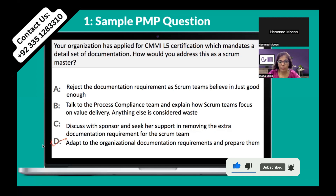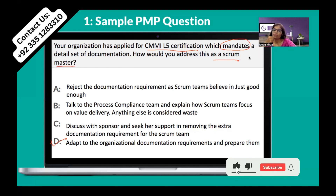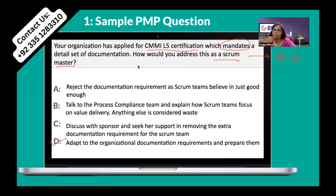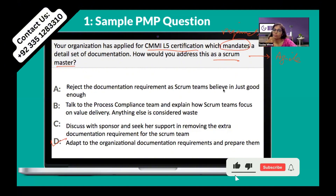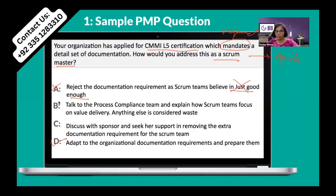The question is that the organization is applying for some certification level and that set of documentation is mandatory. As a scrum master, how would we address this? The project has been assigned to a scrum master to complete the documentation required for the CMMI Level 5 certification. Option A says reject the documentation requirement, as a scrum master believes in 'just good enough.' As per the Agile Manifesto there should be less documentation, but as a scrum master I cannot reject anything assigned to me — so option A is rejected.